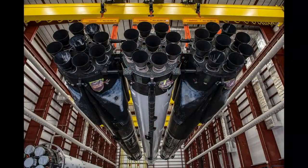In terms of the work ahead, the design of the final trajectory is being optimized as we speak. SpaceX is in the process of getting the final mass properties and engine tables, and trying to squeeze as much out of the vehicle as we can. In terms of the hardware that we need to launch Europa Clipper, all of it is here on site getting processed. The side boosters are going through final refurbishment, and we expect to start booster mate at the end of this week. I'll point out that for our mission, there's no requirement for a static fire test. It's been determined not required based on the health of the launch vehicle and the ground system.